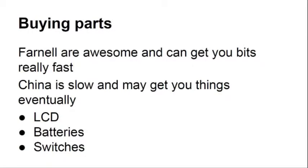One of the worst ones is the processor. Getting hold of 1,500 processors is quite hard, especially when you can't wait for the 13-week lead time. Thankfully, they had 1,900 in stock, and I asked, can I pre-order these and allocate them so that I can have them delivered at some point in the future? Because we still weren't sure we were going to have enough money. I might not actually be able to afford them. We might not have a badge, so we might have to cancel this order.